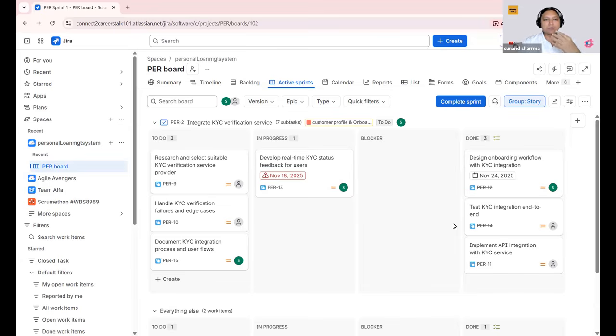And yes, if the projects are completely unrelated, for example, one project is for HR, another for finance, or another for infrastructure, then combining them into one Kanban board usually creates confusion rather than value. Okay? So use one Kanban board across multiple Jira projects when the teams collaborate on the same business goal, they share a similar workflow, and need end-to-end visibility. Otherwise, keep separate boards to maintain clarity and focus.